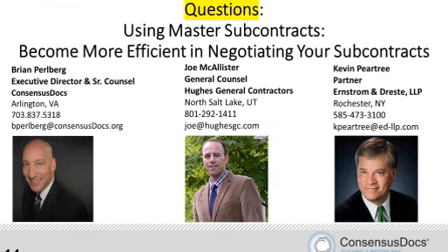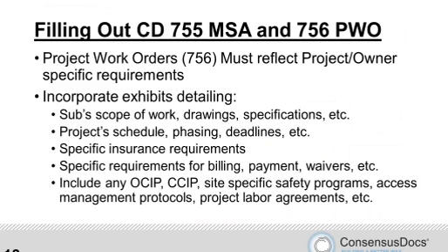And Brian, if I could jump in, I know we're coming up on the 1 hour mark, though we're available to continue on and address some questions. What I wanted to address is the vetting process, if you will. When you are thinking about using a master subcontract agreement, it's certainly been my experience with clients, and I also think it's a good practice, to vet those whom you would welcome into the use of a master subcontract agreement. Certainly you want to vet all of your subcontractors as best you can, but for those that you're going to